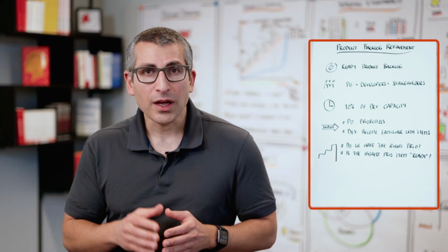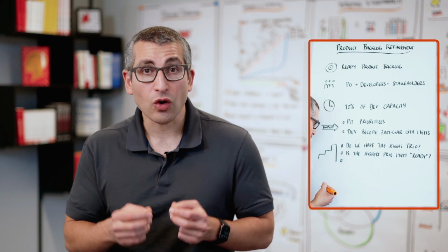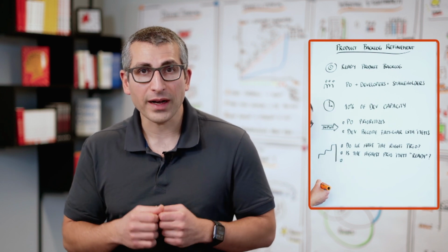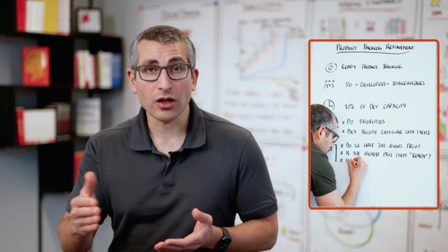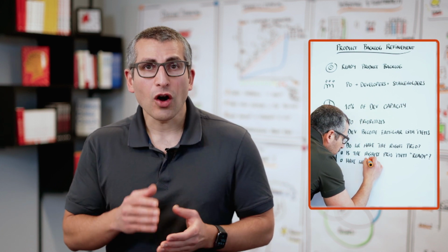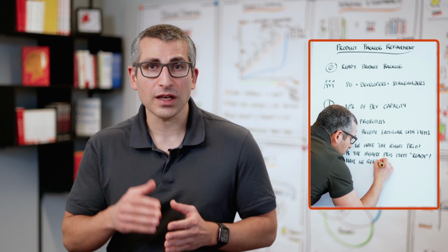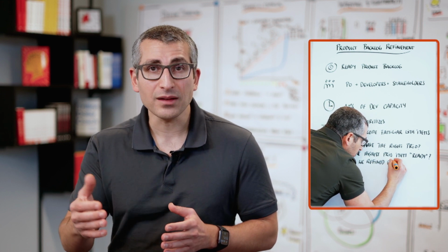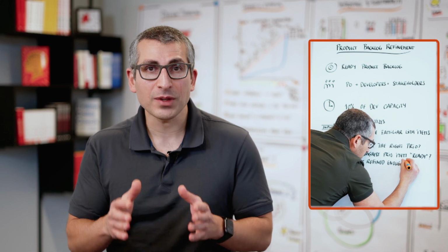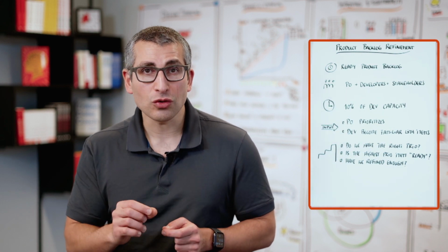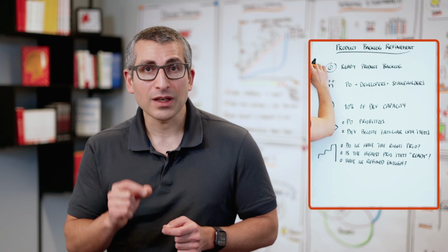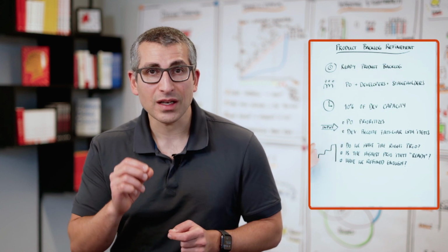In the third step, we would look at how many items or how many points worth of items we have already refined. If that goes beyond our existing velocity, or maybe 2x of that velocity if we're planning 2 sprints ahead, then we can stop refinement right here, right now. Because our objective is to do product backlog refinement just in time and just enough.